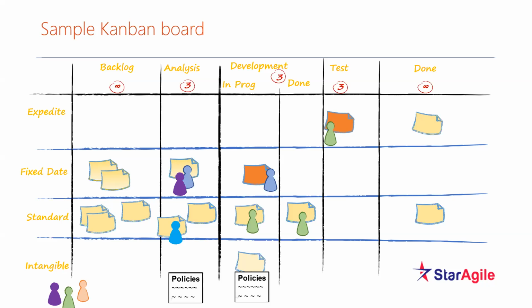There is a concept called Little's law, which provides the relationship between throughput, WIP limit and the lead time. So based on the lead time and the throughput which you require, you can manage the WIP limit. Throughput is nothing but the rate at which you deliver your work. So if you want to deliver your work faster, your WIP should be lesser. Otherwise, your lead time will increase if your WIP is higher. That is what Little's law states. Based on that, you can also determine your WIP.